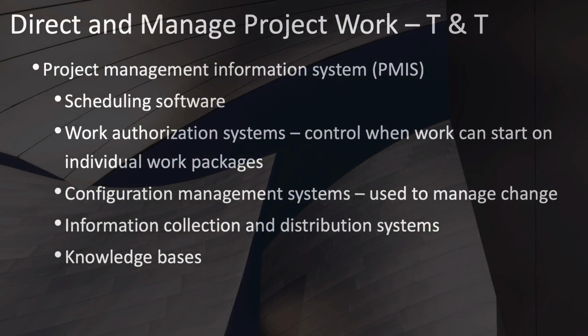Your project management information system should have a number of tools to help you, including scheduling software, your work authorization systems, which specifically control when work can start on individual work packages, so that people don't start working on things before they should be. Configuration management systems, which are used to manage how changes are made to controlled items. Information collection and distribution systems, as well as useful knowledge bases.